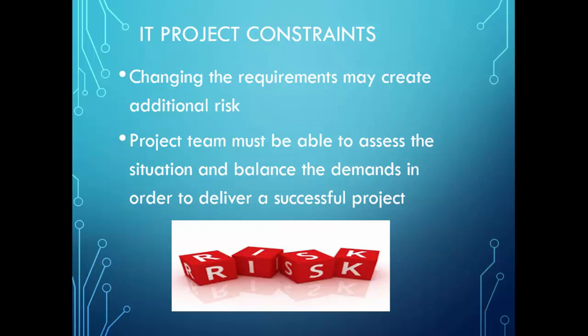Changing any requirements, especially when the project is almost towards the end of it, or after 50%, will create additional risk for the project and for the team. At that point, the project team must assess the situation, look at the risk that will be related, look at the alternative solutions, and look at the impact of that risk on the overall project outcome.